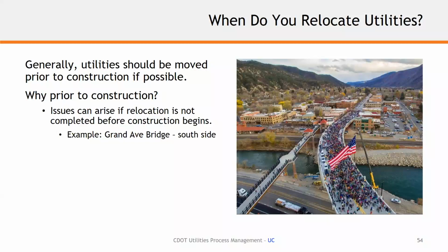Right, and all the way back in the planning phase of this process, we've reached out to utility companies and said this project is coming. We've gotten their data, we've identified what's in the field, and we've asked them for opportunities to comment. As we step through, we've shown them our potential conflicts, what we're intending to do, and we've worked through the work plan that you talked about.